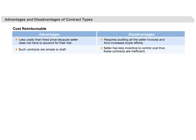So the best option for the buyer is to start with a cost-based contract, and once there is more clarity on the work, move on to a fixed-price contract.